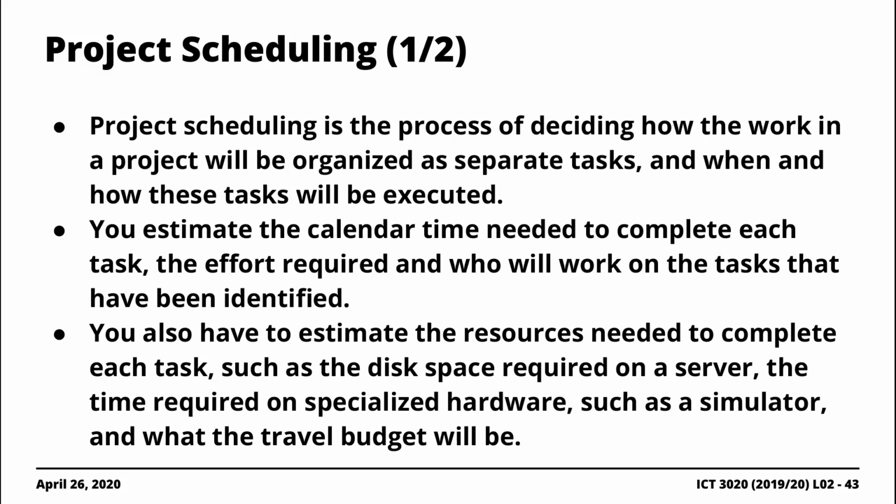A misconception that most people make, at least at the beginning, in project management or project scheduling is neglecting to remember that you can actually schedule tasks in parallel. So it doesn't necessarily mean that if you have identified a total of 20 tasks aligned with your project, then you should execute them one after the other. You can, in fact, interleave them and execute them in parallel if you wish.